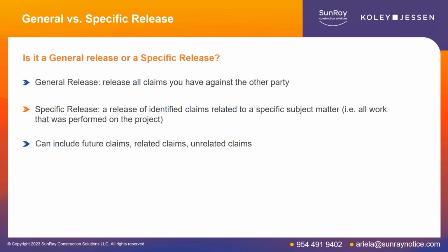One of the reasons that this is so vital is that in a settlement release agreement, you can release future claims. And so from an owner's perspective, that may release unknown and concealed construction defects. That may put you in a position where you no longer have warranty rights, or you no longer have the ability to go after a contractor if the roof collapses 2 years after it was installed through no fault of you or a natural disaster.